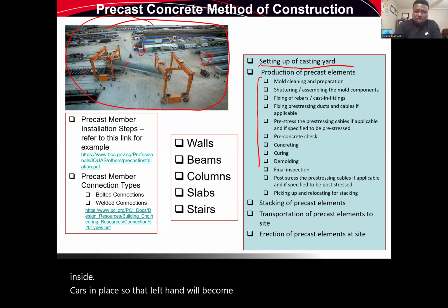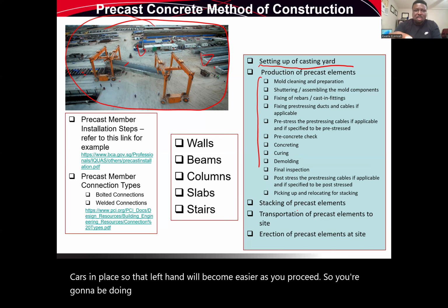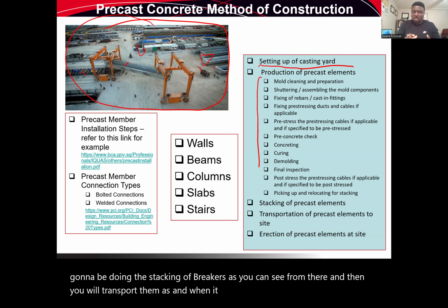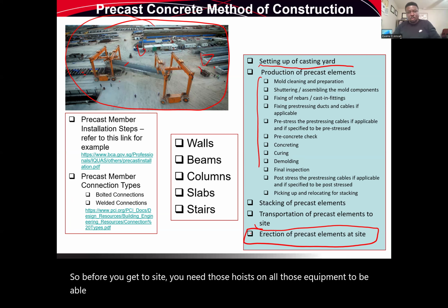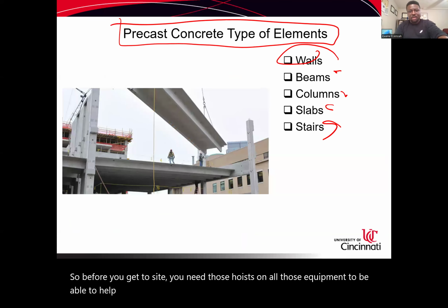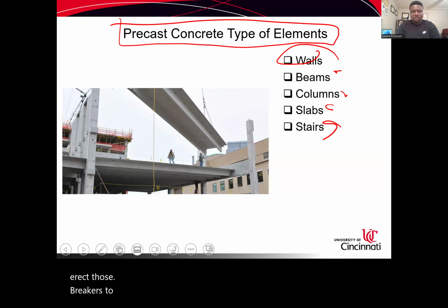So you're going to be doing the stacking of precast, as you can see from there, and then you will transport them to site as and when they are cured enough, as you need them. So before you get to site, you need those hoists and all those equipment to be able to help erect those precast to different heights as it is, yeah.